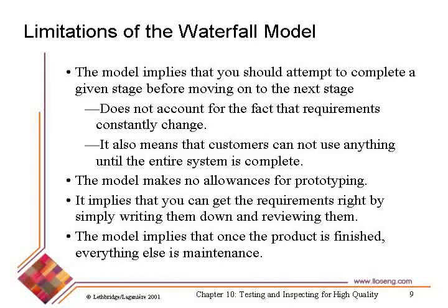One reason why it's inefficient is because, let's say I have to finish the design before I code. That means that maybe you have some people who are going to be focusing on implementation. Well, they've got to wait for the entire system to be designed. That doesn't make much sense. It might be better to have some people get right into the implementation when part of the design is ready, part of the design of some subsystem. It also doesn't let you think about prototyping. It isn't explicit in this model.